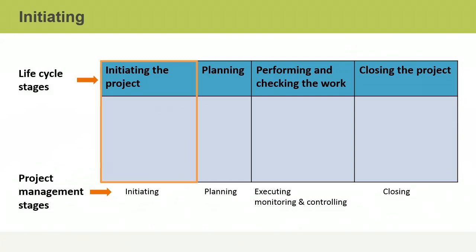The project charter contains the business case, high-level budget and schedule information, a high-level scope definition, and high-level risks. During initiating, the key stakeholders are also identified.